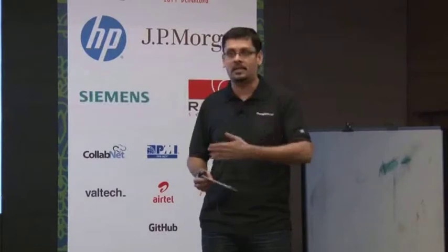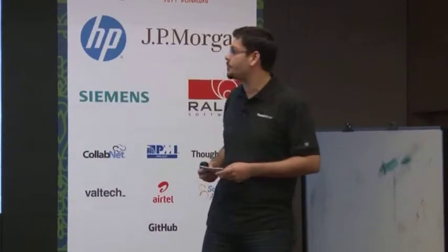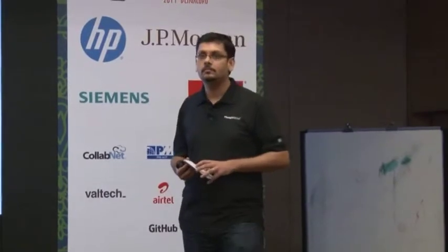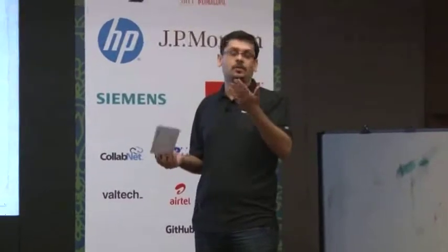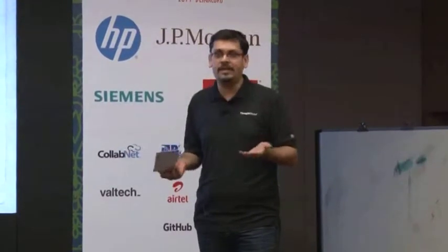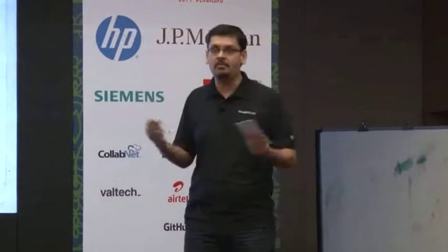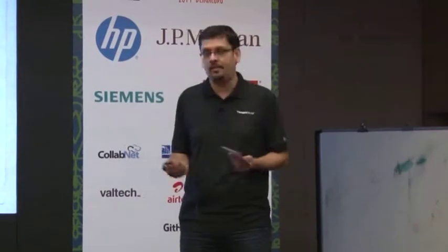So we will try to make sure it's considered by client stakeholders and by our own teams as a single unified team. We're not trying to create divisions other than for purely practical reasons, like dividing up features and things like that. But if the features are distributed, then it will obviously happen, right? The data will itself speak like that. But the question is, if the features are distributed, won't the data? Yeah, the data may tell you something like that, but there's no reason to actually track it that way. It's a team velocity, it's a team planning effort, it's a team output that we're doing. So while the temptation may be there, all we're saying is resist the temptation to look at the data as, oh, this is my velocity in Chennai, this is my velocity in New York, and so on.